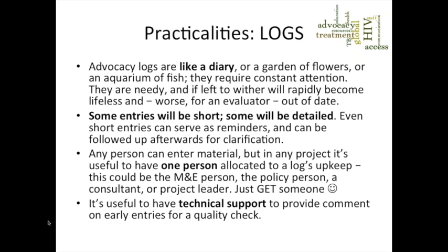And I mentioned earlier, I'm working on a project that covers Philippines and Sri Lanka at the moment. One of the countries is really good at keeping their logs up to date. They maybe have 2 or 3 entries a month, which is fine, because during a 3-year project, that will give you 80 or 90 entries by the end of a project. The other, I know for a fact, hasn't filled in their logs since November 2016, which is fine. And what they did in 2016 was fine, what they put in the log, but they haven't filled it in since then.